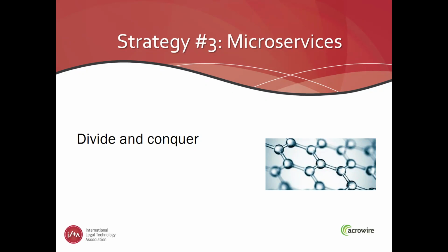You must be careful, though, to ensure interoperability between old and the new systems, and you now have 2 sets of technologies to maintain. Also, because of the iterative nature of this approach, there is a chance that you might lose focus and never accomplish the long-term goals as the immediate needs of the company appear bigger on any given day. 2 benefits to this methodology are that you will begin seeing an ROI upon the release of each component or service, and your commitment doesn't extend beyond the service you are currently working on. Once it's live, you could table the greater project for other priorities as needed.